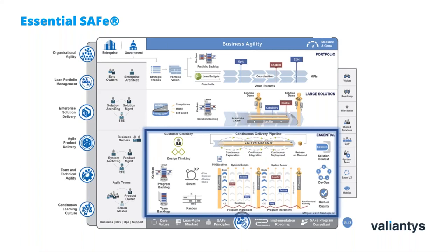And then we see an Agile Release Train, a team of agile teams, also known as ART, which is related to a continuous delivery pipeline. So ARTs are organized around the value streams, and they continuously deliver customer value with minimal dependencies outside the ART. And the phases of the continuous delivery pipeline, like continuous exploration, continuous integration, and continuous deployment, happen in every iteration, and the release on demand happens more or less frequently as needed. So we also see an event called PI planning, followed by 4 smaller iterations which have system demos at the end.